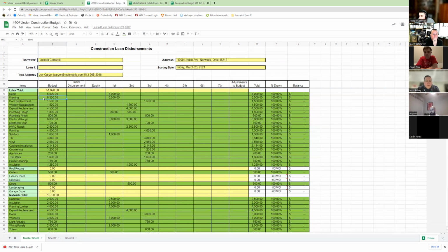And here's another little tip. I know none of you have full-time or part-time employees right now, but let's just say at some point in your life or business, you do get to that. I always look at my worst case cost. So I look at my most expensive employee's hourly rate, and I base my projected cost on that.